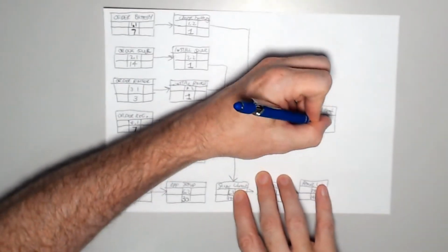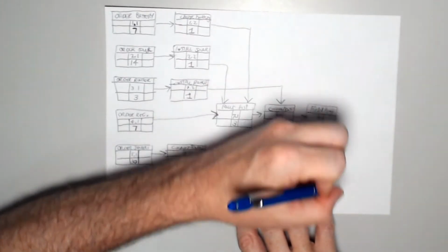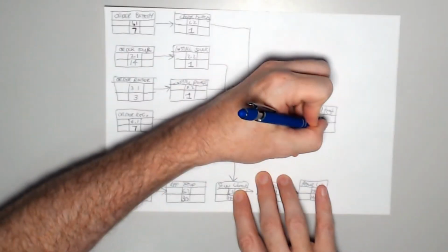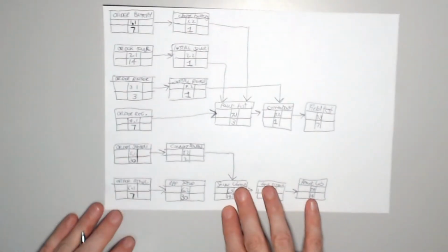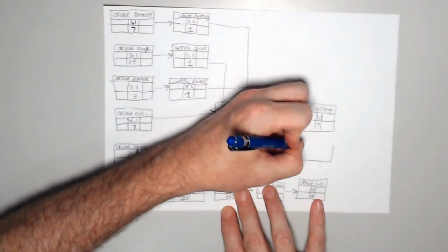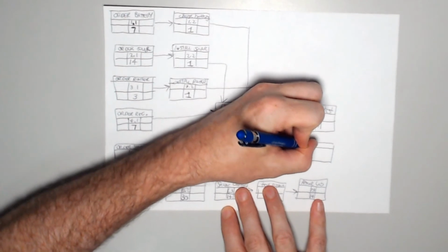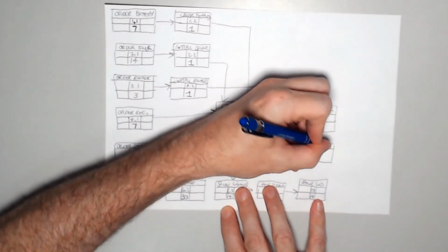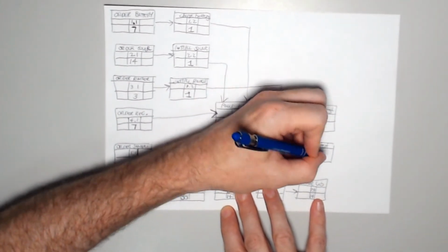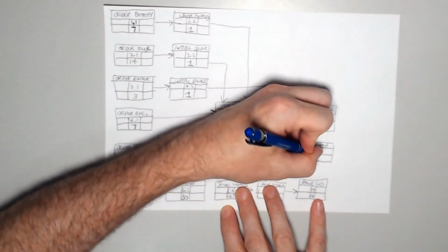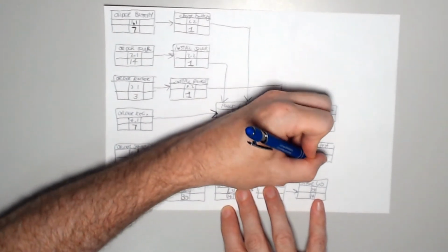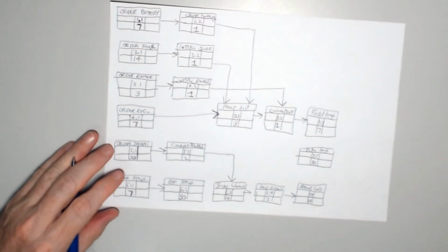So that was 7.3, and it's going to take 7 days to do that. And then once that field test is done, we can do our final test with everything together. I've called that a beta test. That was task 7.5, and we're going to do a really long test, so 30 days for that.